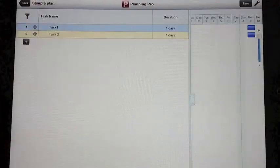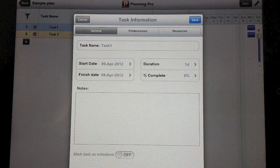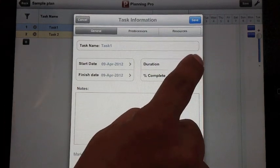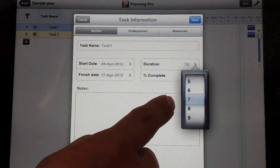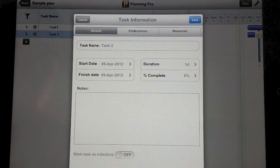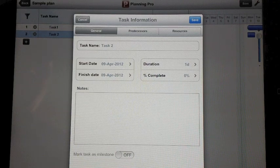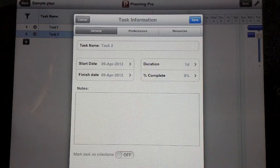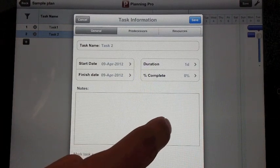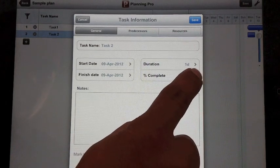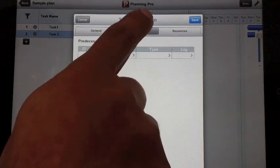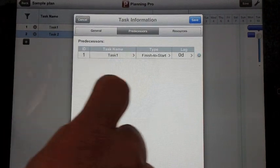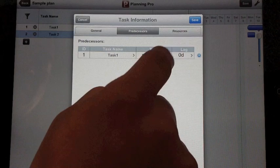You can double-click on the task, which prompts you with the task information window. Let me set the duration to probably 5 or 7 days. Now the task pop-up has three types. The general information where you can put in your start date, finish date, duration and percentage complete. It also has mark as milestone. So let me say the plan is 35% complete. The predecessor for this task is task 1 with the finish to start date as the relationship, 0 days lag.